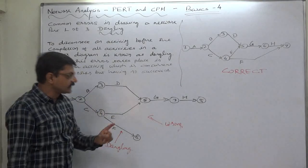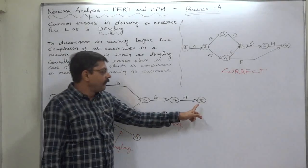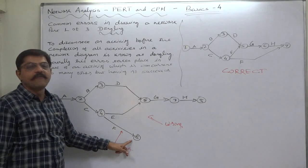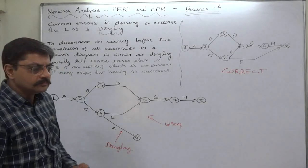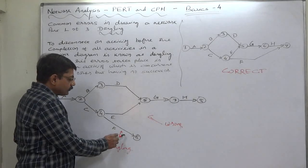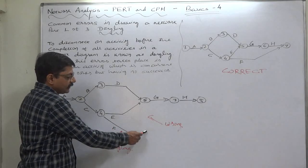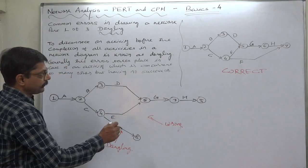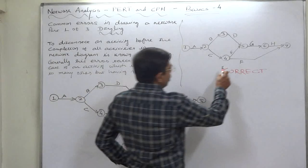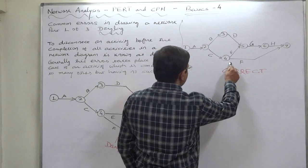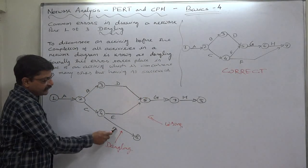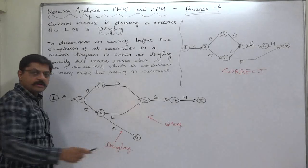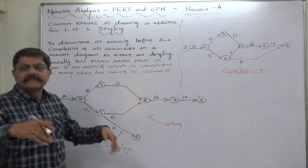The project is considered finished when H as well as F both complete. So the diagram should not be drawn in this way. This is the wrong way of drawing the diagram. We should draw the diagram something like this. See, C is the common predecessor of E as well as F. F is not predecessor of any other...